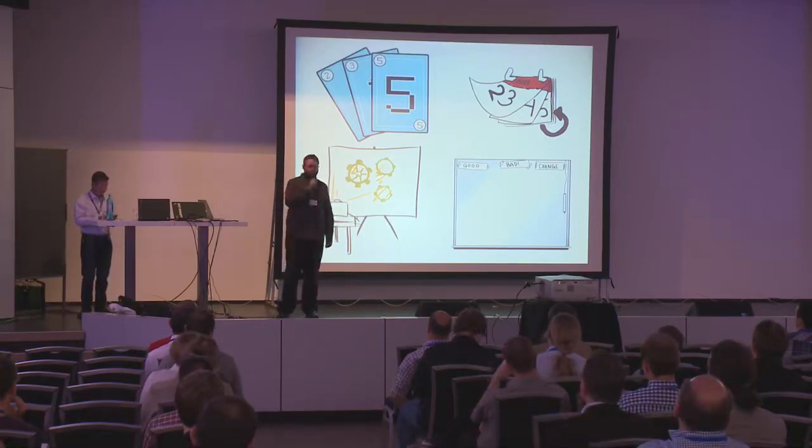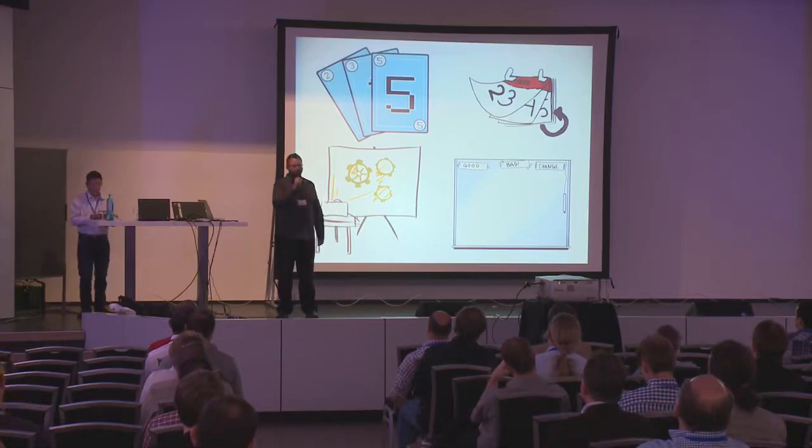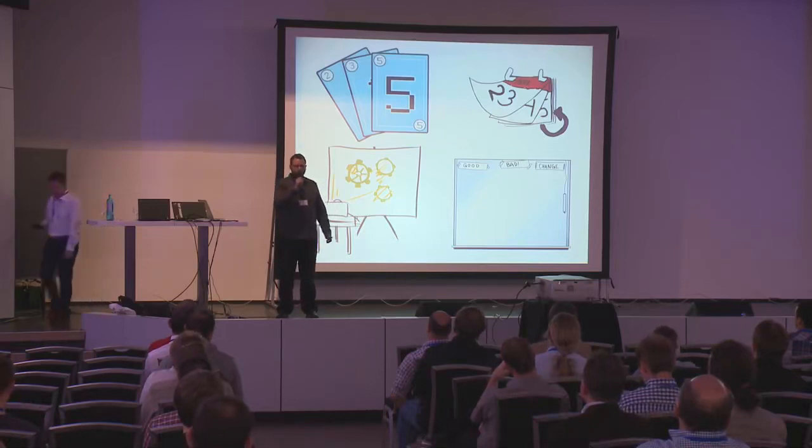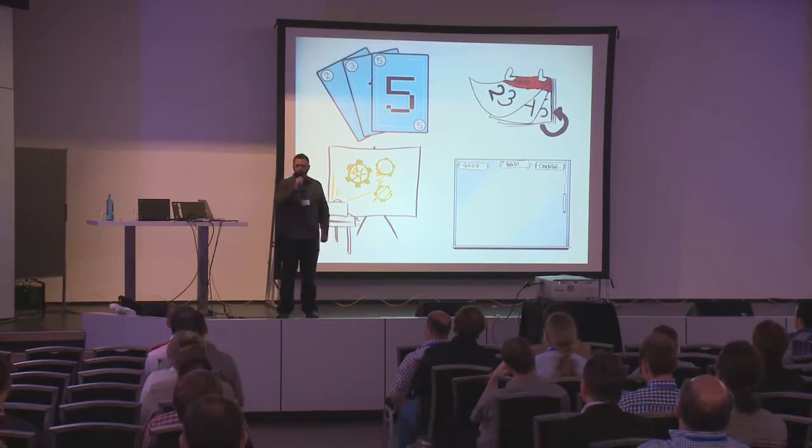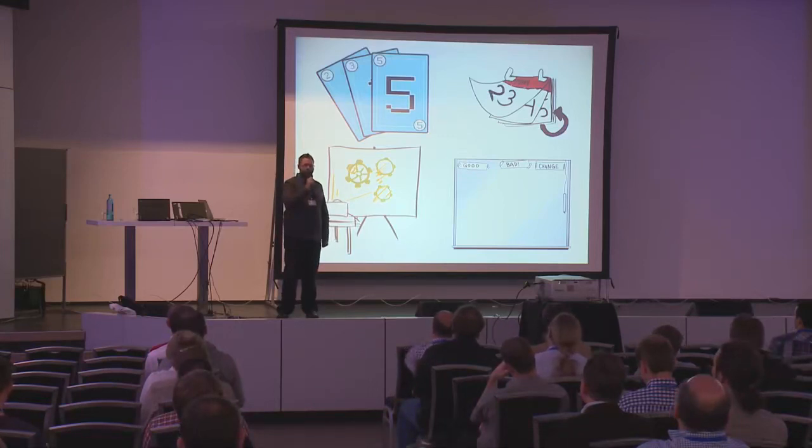Second is the daily scrum, also sometimes called the daily stand-up, because frequently it's a standing meeting that's intended to be very short, and it's just a daily check-in to say what's been done so far, what's still to be done during this sprint, and are there any blockers that need to be dealt with to complete the sprint on time.